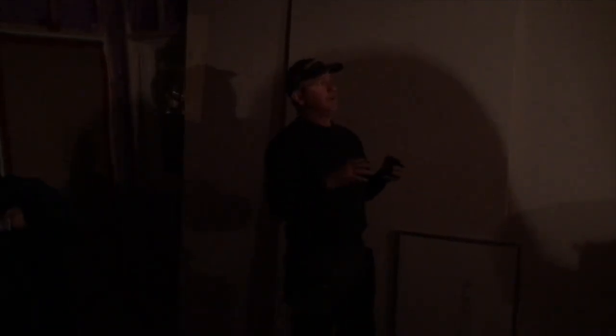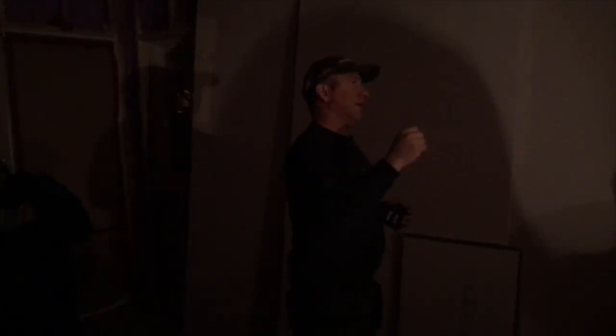The stage that we're at is the framing is complete, the electrical is complete, and the heating and all of the stuff that goes inside of the walls is complete, and we've passed insulation inspection. Very important. Don't forget to get your inspection. I always recommend at this stage as well, as everybody walks through, take videos and pictures, because inevitably you're going to put a nail in a wall and it's going to hit something, or you're going to want to know if you can mount a TV. It's really nice to go back on your computer, look through a video, and remember that you can hang a cabinet on that wall or something like that.